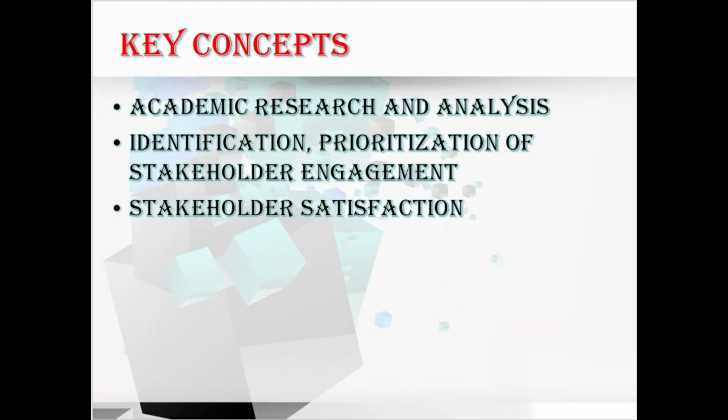To increase the chance of success, the process of stakeholder identification and engagement should commence as soon as possible after the project charter has been approved, the project manager has been assigned, and the team begins to form. So, it has to be done before the project starts.